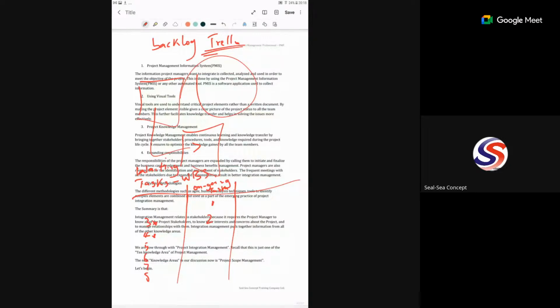And then here is task done. So once this team finishes task 1 and task 2, they bring them to this task done, and then they clean up this. They come back here to the waiting task. They pick items 3 and 4. They become the ongoing now, and then they cancel them here. So this is what you can imagine.